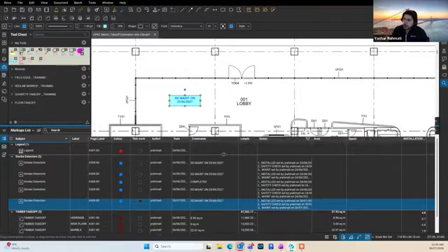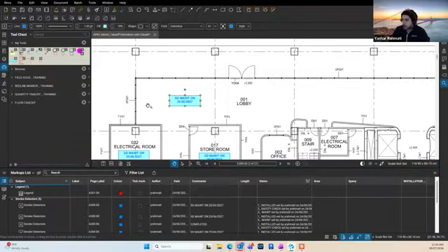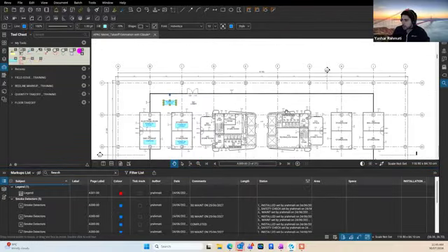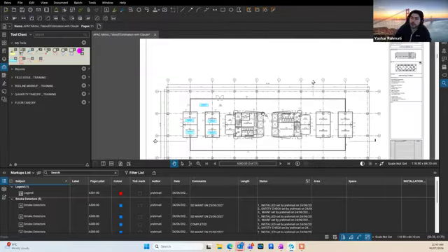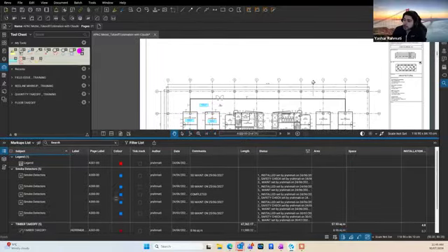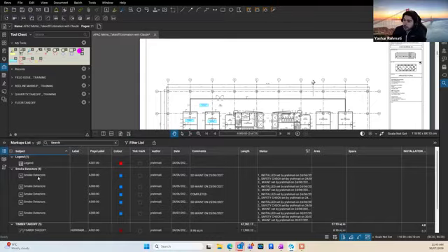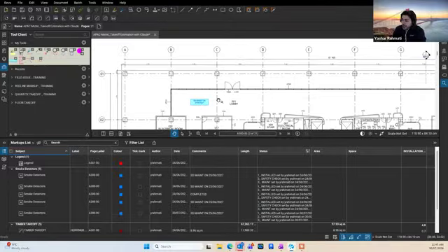So this is a long process because there are so many electrical components that we need to install, and we need to run the safety check or schedule the maintenance for. This is just a very small example, where I only have 5. So we end up having a list of items in our markup list with a lot of statuses, and some of them may be missing a status, or some of them may not. At the end of the day, we just want to quickly generate a report of all the smoke detectors that have some missing steps. For example, they missed the safety check step.